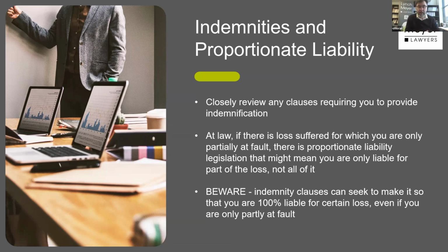They want to try to make it easier for them. They don't have to worry so much about trying to get to the bottom of who's, is that person 20% liable? Is that person 5% liable? They're trying to lock in as much liability as they can. And what you've got to do as a contractor is try to say, no, look, liability should fall where it should fall based on a fair apportionment of fault. So if I'm 10% at fault, I should be 10% liable.